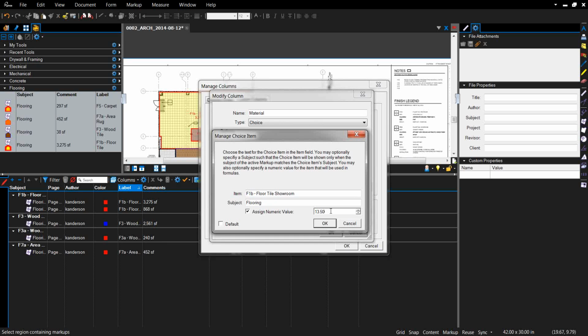If you don't know it, it's helpful to look back through the GMP or the bid for your job and look at some proposals from the bidding subcontractors. Oftentimes they'll list unit prices, or they'll have their total bid and list quantities, and you can kind of work it out. If not, ask your subs for a rough order of magnitude. Keep in mind you want this to be furnish and install, not just material price, if you're using an RS Means book or anything of that nature. So that's where you put your unit price.